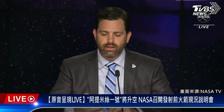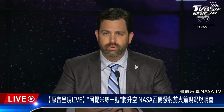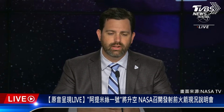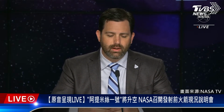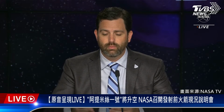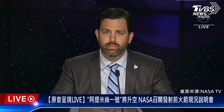Yes, ma'am. It's a good question. Right now, our flight termination system is the pacing function for needing to roll back after this launch period, and it's based off retest requirements. The range says every so many days prior to launch, you have to test that flight termination system. We worked with them and provided data for a little over 20 days since we tested it to launch time. We believe we would need to roll back and retest that system just to meet the range requirements. So after 9/6, we'd roll back and retest. We don't actually have to replace the batteries until the next launch period, but it's a relatively short retest of the flight termination system just to provide confidence to the range that the public will be safe.